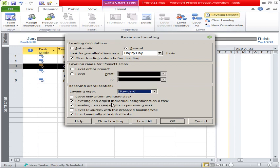Then 'Labeling can adjust individual assignments on a task' means only individual tasks will be adjusted. 'Labeling can create splits in remaining work' means that whatever tasks are remaining can be split by the software. It totally depends on you whether you want to use this option or not.